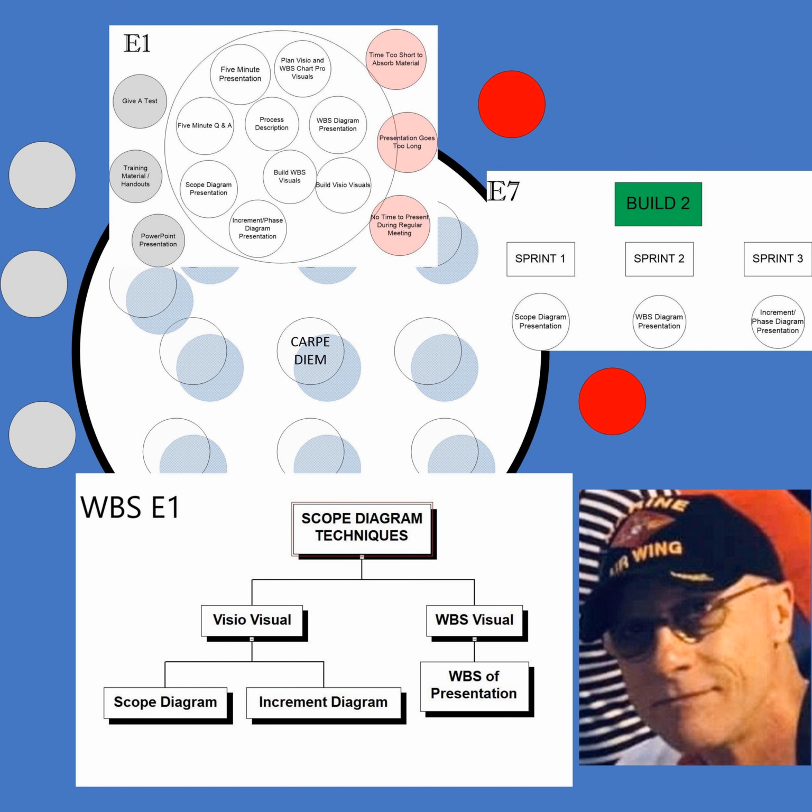These were embedded Excel spreadsheets within the Word report. And then we had the complete wiring diagram, how everything was connected, another embedded Excel spreadsheet within the report. Their insurance, since we were moving it pretty far: who insured it? How much was it insured for? Security: did they have an authority to operate? All these things I needed, and I needed to make sure they had planned who was going to be there when we shut down the system.